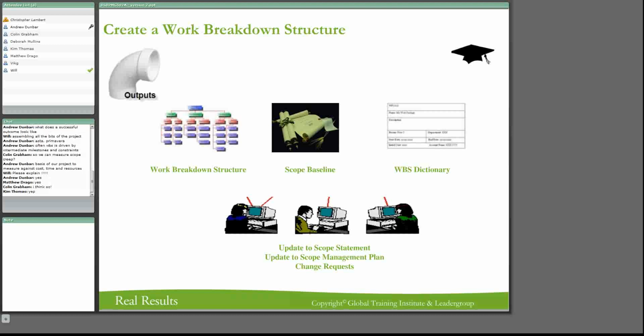All right. Okay, let me just try and summarize it. We said that there are project groups, and the first group is project initialization. Now, when you do your project initialization, you do not have a complete scope. You have an initial scope statement. By the time you finish your project planning, you will have a detailed scope. Between that initial scope and the detailed plan, there are going to be changes. And your change requests start up front from your initialization, because you're going to make changes to that initial scope statement, and it needs to be documented.